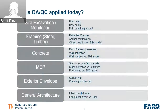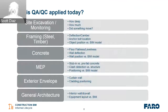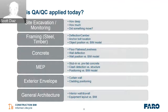Where are we applying this today? Many of you may have already been doing this in your normal work without 3D laser scanning or more high-tech tools. We're trying to make that job easier. Examples of where we can apply technology for construction verification include: concrete floor flatness, wall deflection, site excavation, determining beam camber, stub-in location for MEP, determining the position of your model versus how things are being installed, curtain wall, and prefabricated paneling and cladding. These are all areas where we need to build and verify — something we've done in manufacturing a long time, and now we're applying to construction.